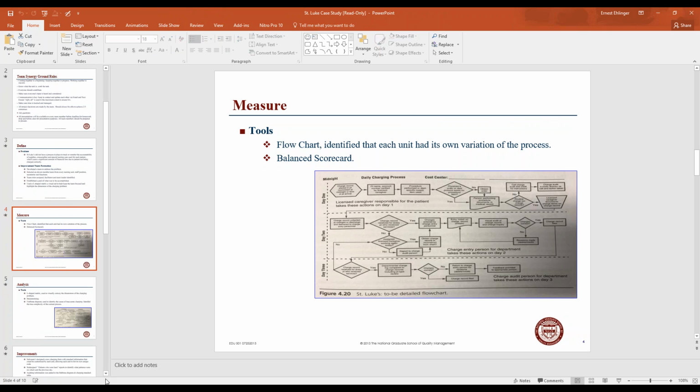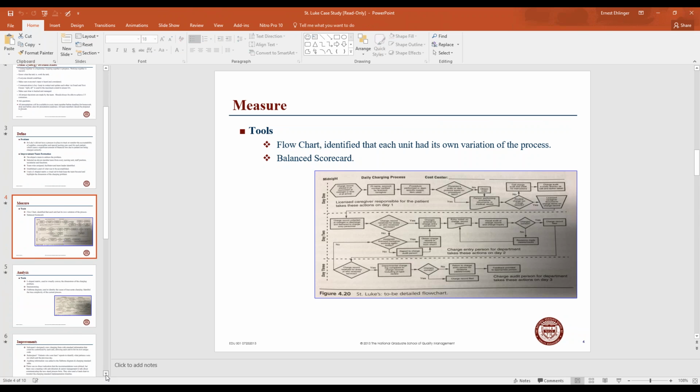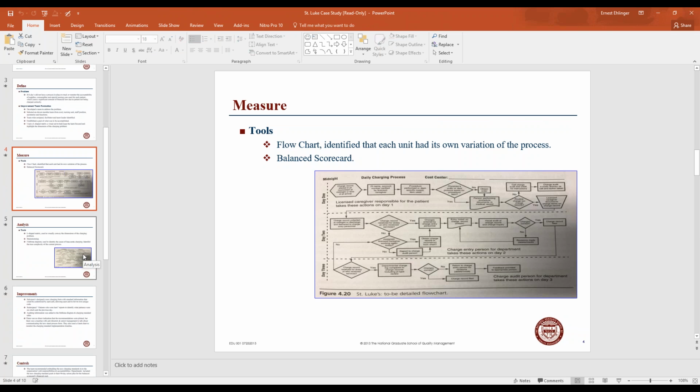And that's going to be one of our standard tools that we'll be using in the MVP and variations of it. The first set of flowcharts we're going to have you do is going to be a macro one, which is a high-level overview of the project. It's really for scope. We're going to figure out the start point, the end point, and what's included. And then later you do a more detailed one, which will be something like you have here. This flowchart here, a functional one, the chartology of it, is what we're looking at as well when we start using flowcharts properly.